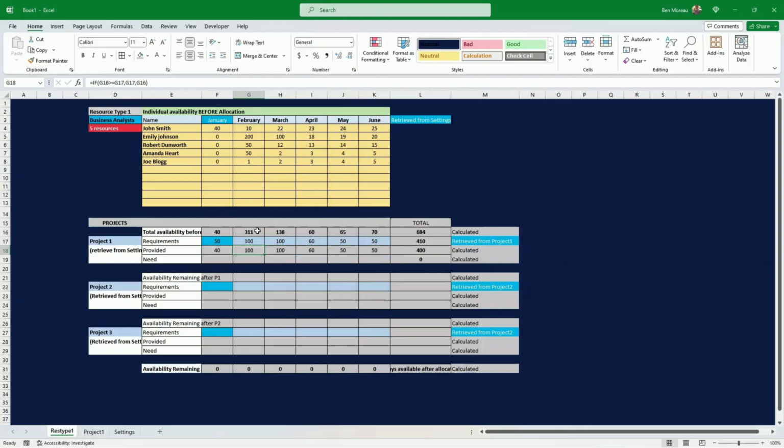For instance, we had 311 available and we wanted 100, so we're not greedy, we just take the 100. So this is what is provided. And then the bottom is what else is needed. Do we need more? So it's just a matter of deducting what has been provided from the requirements. And this is it. So we're doing quite well. We just need 10 here on the first period, and all the rest has been provided to us. Obviously here there's some 200 that looks a bit dodgy, but if we put a max of 20 here, for instance.